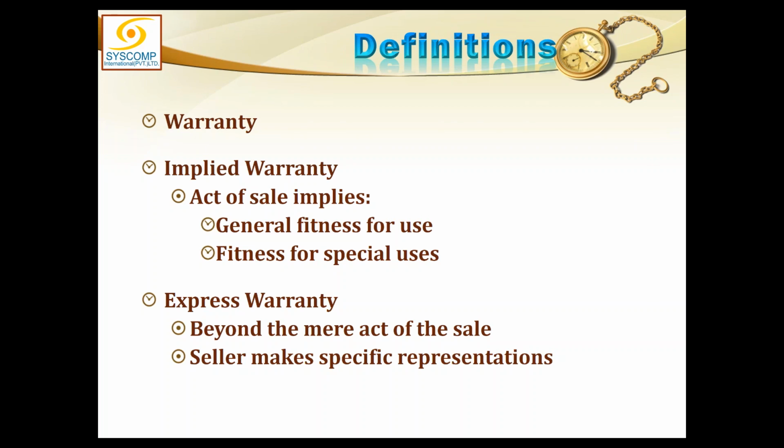Without having given any warranty, he sold me a glass, but the thing is not performing the duties of a glass. So this is the implied warranty, that if the general fitness purpose or the special fitness purpose is not being complied with, the item procured may be returned.